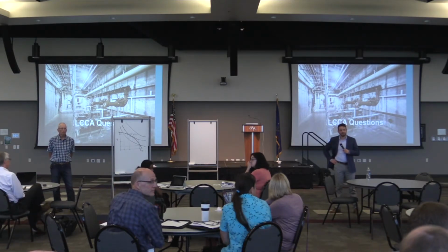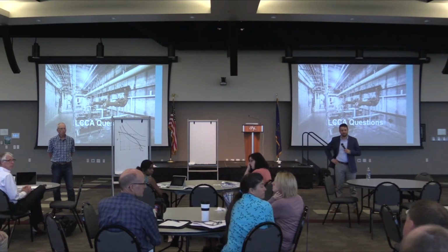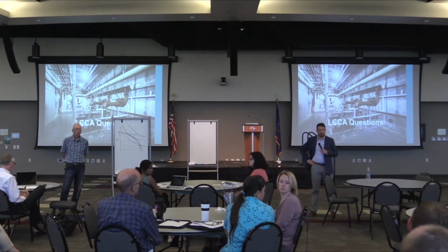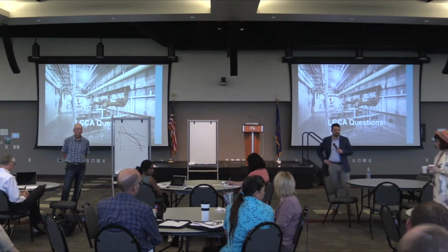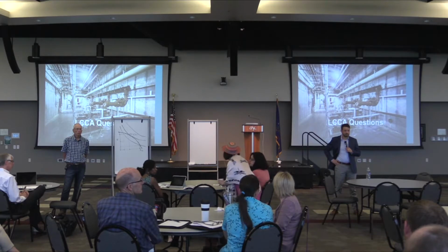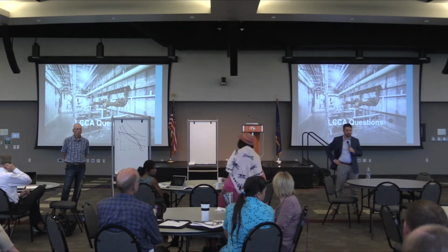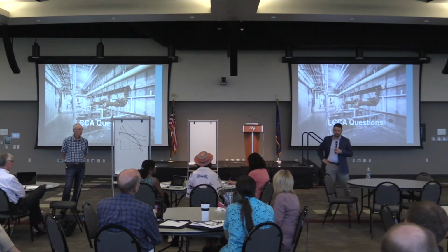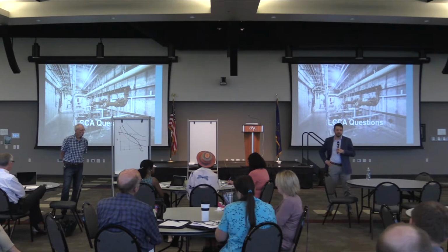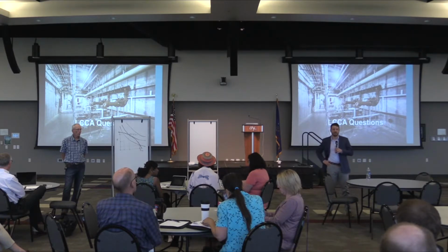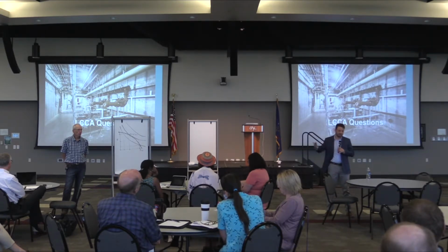This is probably more a question for Pat and staff, but I'm going back to Jeffrey's question and point on using a standard discount rate. Are we going to have annual updates to the model or to that guidance to standardize that across the state? Yes, every year that it changes, we'll update the model and the guidance to deal with those changes. The updated discount rates appear every October, because it's based on the federal fiscal year, so the guidance memo comes out in October. Actually, it's a month prior to October, so they can anticipate those changes.